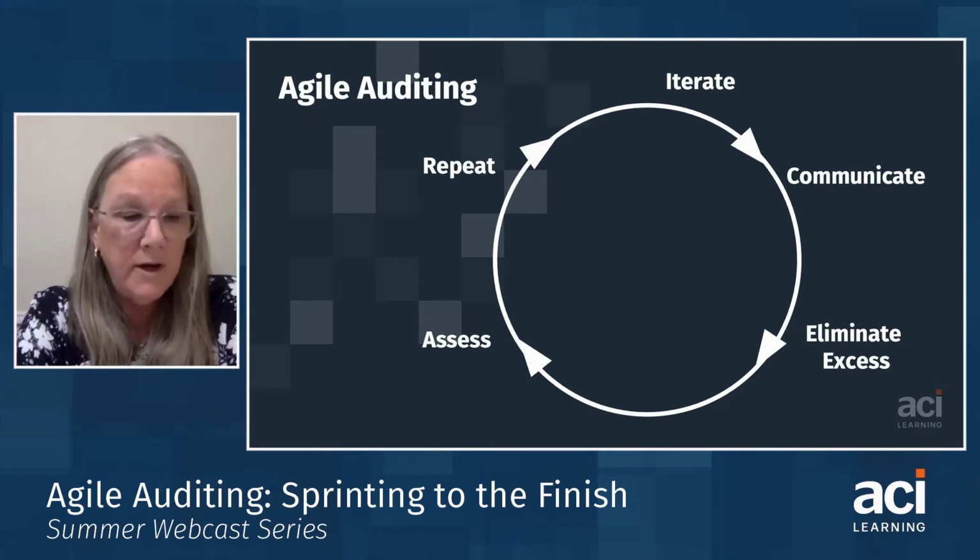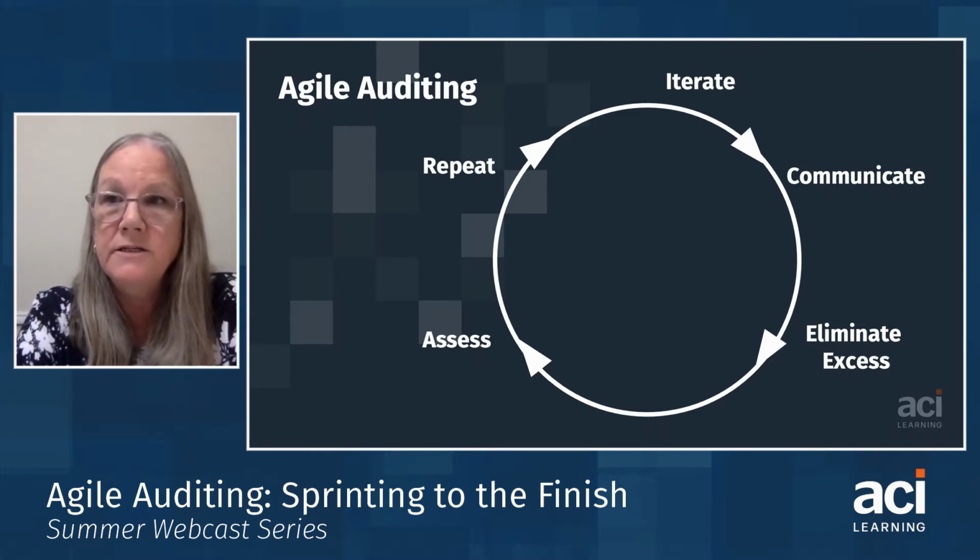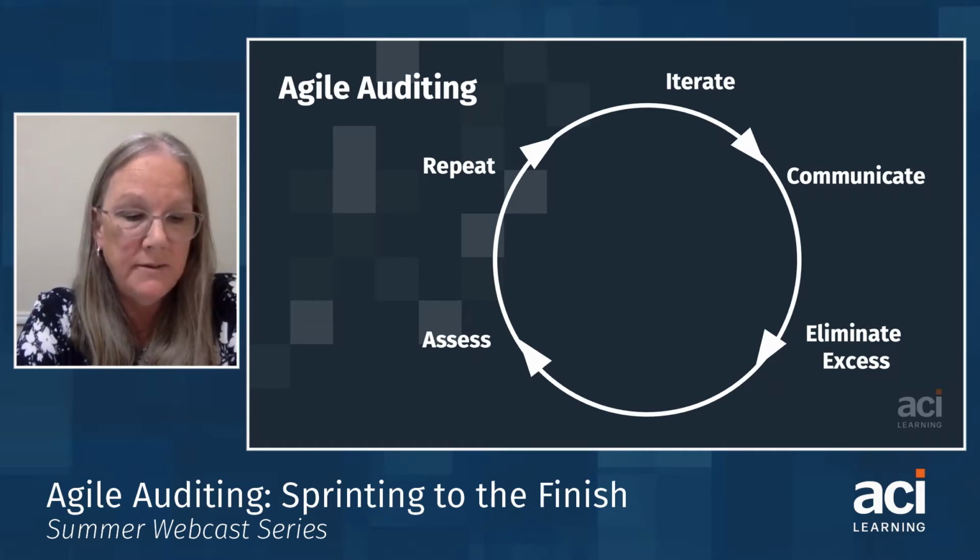The next thing that I wanted to focus on was communication. So communication, I said this, the Scrum Master is an important part of the Agile process. So daily stand-up is going to be, just as it is in software development, part of Agile Auditing as well. And no more than 15 minutes. We want to make sure that each team member is going to step up and speak about what they are in the middle of.